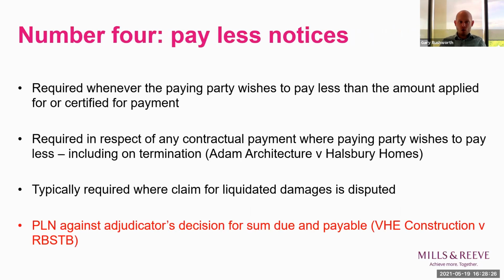The fourth area that I want to look at is pay less notices, and a few points that crop up with those. So as Patrick said, they're required whenever a paying party wants to pay less than the amount that's been applied for or which has been certified. A slightly niche but important point to bear in mind is that pay less notices are required in relation to any contractual payments that arise on termination under the contract. So if there's a termination event and it leads to a payment being due from one party to the other, which there almost invariably will, if the other party disputes that payment, it needs to serve a pay less notice.